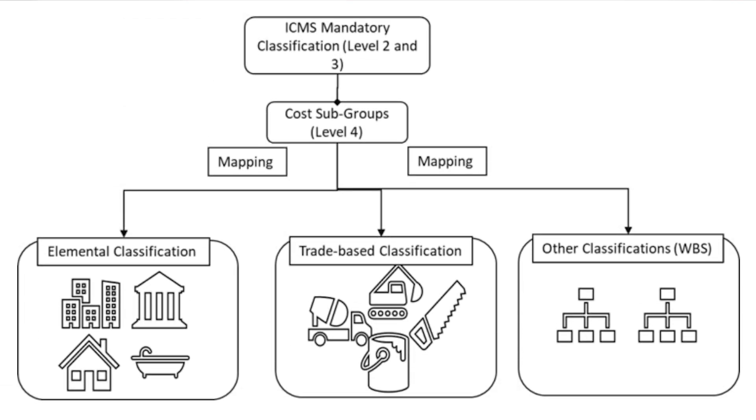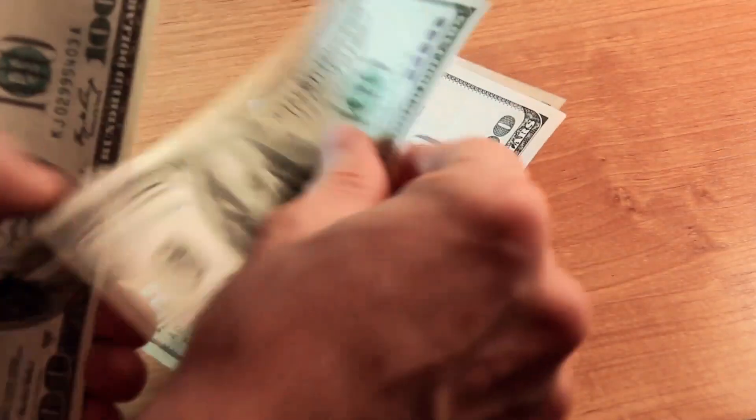To make a cost estimate using NRM1, you need information from several parties. From the employer: site location, storey height, intended use of the building, floor area or bed capacity (for hospitals), refurbishment requirements, quality and sustainability requirements, fit-out requirements, a rough programme with milestone dates, any client restraints, detailed site information (e.g., ground contamination, buildings to be demolished), target lifespan of the structure, and any cash flow constraints.